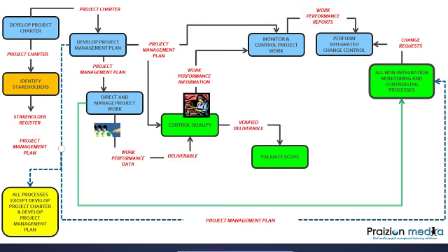Now, of course, from direct and manage project work, we have this big old pipeline. I call it the WPD pipeline, and that is fueling all non-integration monitoring and controlling processes. Validate scope, control schedule, control cost, control quality, control resources, monitor communications, monitor risks, control procurement, monitor stakeholder engagement, all those ones.